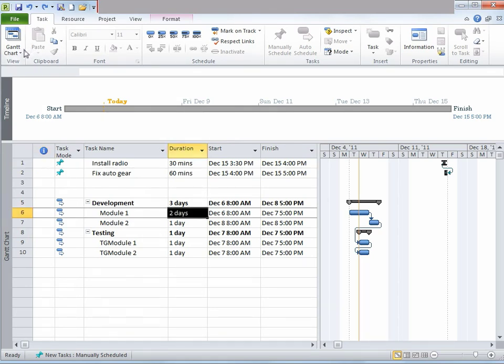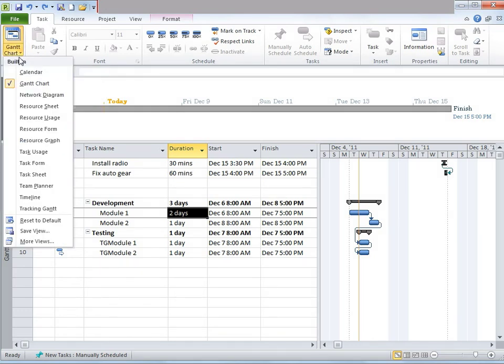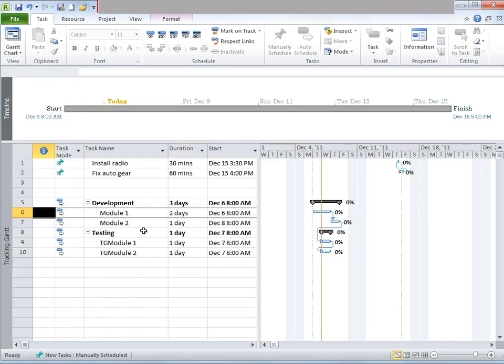Finally, the Tracking Gantt view. I'm going to go to the Task tab, under View, click on the dropdown, and click on Tracking Gantt. Notice that the timeline part on the right-hand side has changed. Tracking Gantt is based on the Gantt view and provides a great visual way to evaluate the progress of individual tasks, the project as a whole, or any level in between. It presents additional information about tasks such as plan versus actual progress and slippage visually, allowing the user to plan necessary corrective action.